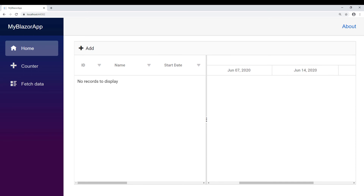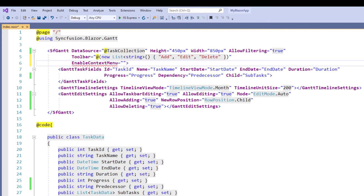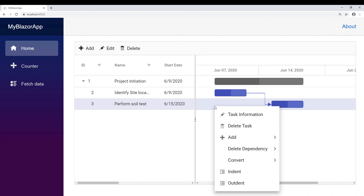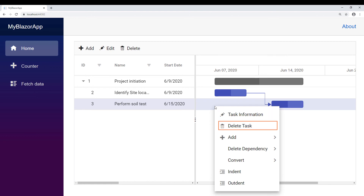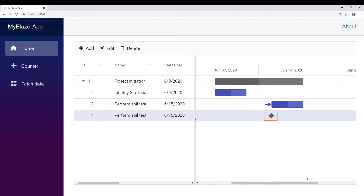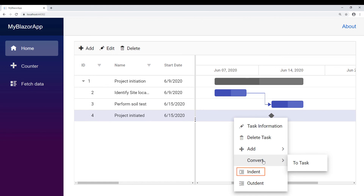I can perform all these edit, add, and delete operations using a context menu. To enable the context menu in the SF Gantt tag, I add the enable context menu property and set the value to true. I run the application, select the last row, and right click to show the context menu. Here you can see options to show task information for editing, delete task, and add options — add above, add below, add child, and add a milestone. Milestones are flags that show the project has completed a set of tasks towards the goal. I can also delete a dependency, convert a task to a milestone or a milestone to a task, and add indents and outdents to a task.